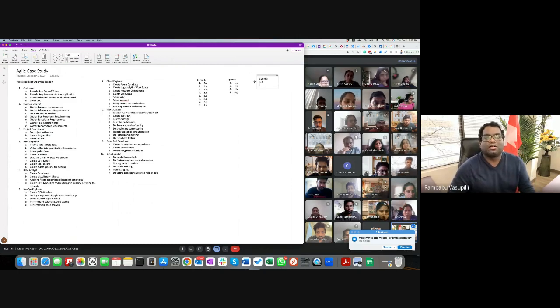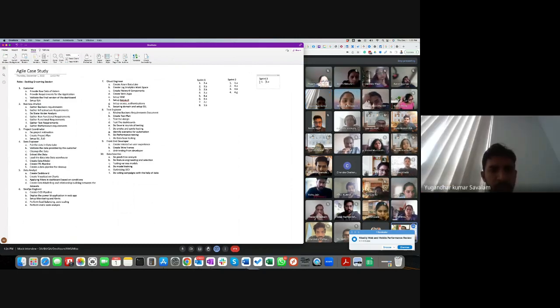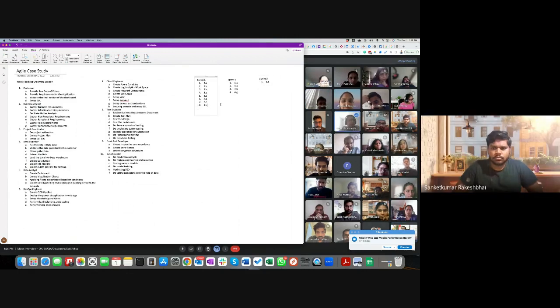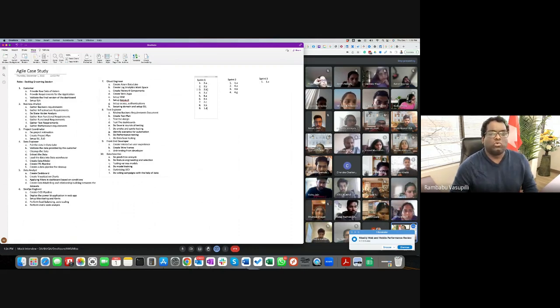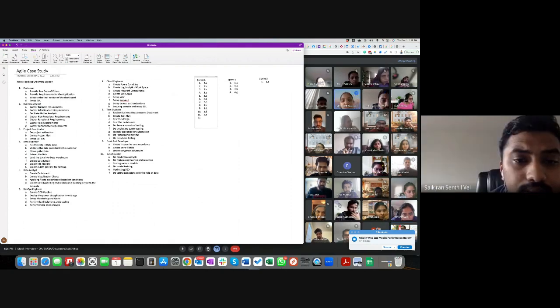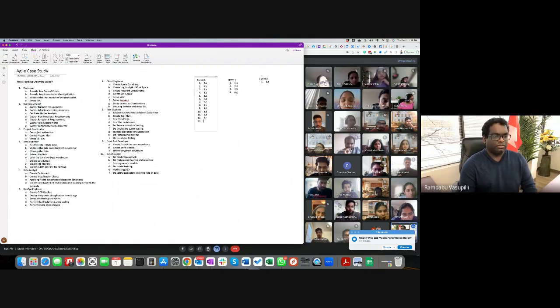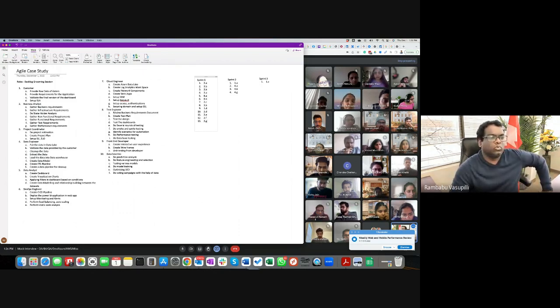Set up SLA. It's sprint 3 only. No, set up SLA should be done on day 1. Okay. Day 1, because if the goal is not set... So 1D. Gather business requirements, 2A here, 2B here, 2C also here, and 2D. Everything should be done here only. 2D, 2E, 2F, and 2G, gather test requirements also. Do project estimation, 3A. In which sprint? First sprint.